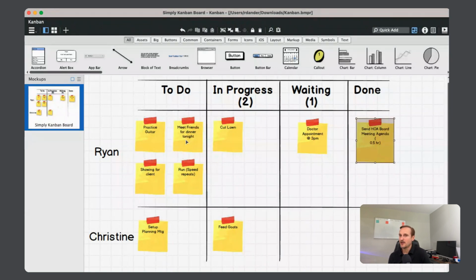And that's really around making process policies. So defining, for example, how do you work on items in various stages? Is there certain checklists you need to do? Maybe even on the specific requirements or tasks, there's certain ways you structure it or checklists you have to check off before you can say, hey, this task can move to the next column. You can define rules and processes for swim lanes. That's your rows going across. You can define them for stages.